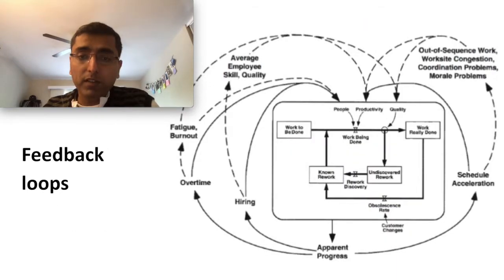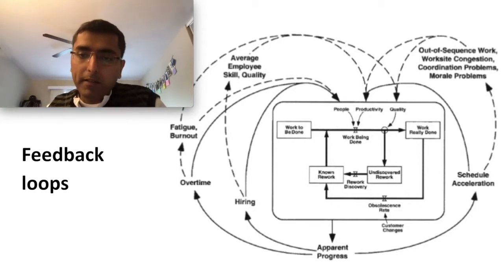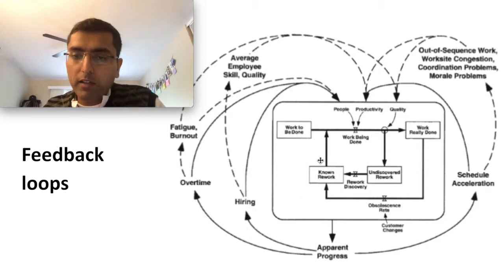And so what the company did was turn this detailed mental model into a system business dynamics model, or stock and flow diagram. They expanded their simple model, and then they also found out that rework had a huge impact on people's productivity, their fatigue, their burnout rate.